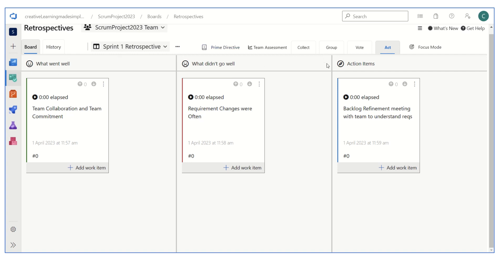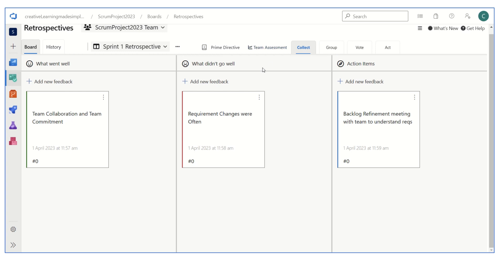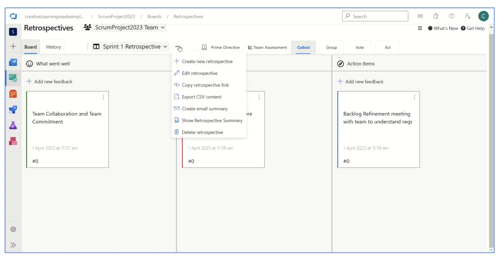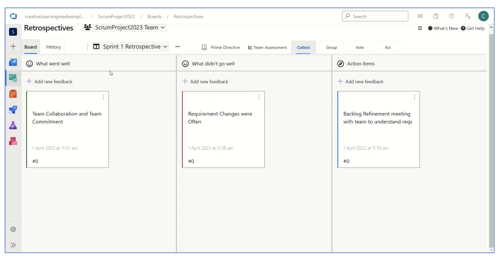This is how we can utilize it. It's quite simple. The idea is we can use this particular template for, let's say, a couple of sprints to three sprints, and then let's try to change the format, which we can always apply from create a new retrospective, choose a different template. Instead of what went well, what didn't go well, and what are the action items, we can also say what is it that we want to start, what is it that we want to stop and continue. That gives the team an idea about how they can apply a different template in the retrospective meeting.